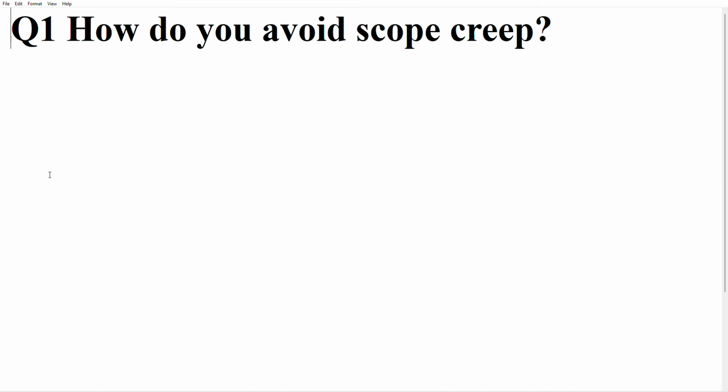Now, in the situations where it's happening over and over and over again, that means the product backlog is not healthy. That means something is not right, so you have to analyze that situation. What is the reason? Why is it happening over and over? Is the product backlog not healthy? Is the conversion of the product backlog into the sprint backlog not being done properly? Sometimes it can be difficult stakeholders as well. So you have to analyze the reason.